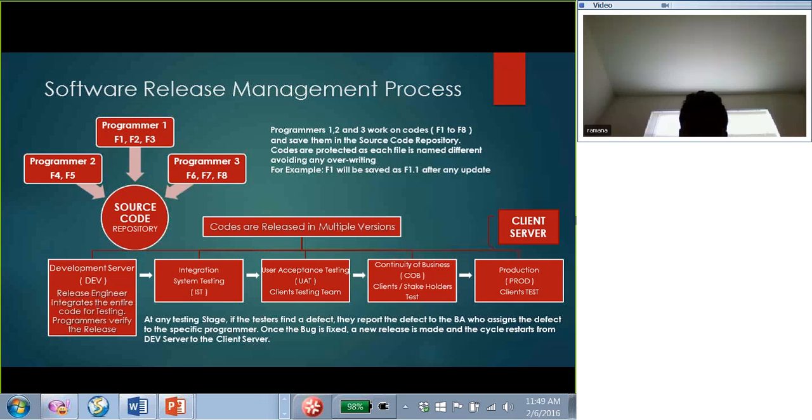And what happens is, even if there are 2 hours of downtime, and there are 10 QAs testing, 20 hours of manpower is lost. We don't want that. So we are isolating the development and testing environments and making sure that nobody interferes with each other's job.